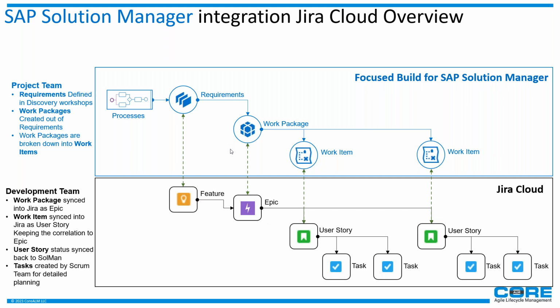And most likely what most customers start with is documenting the requirement in Solution Manager. They do the work packages in Solution Manager, which creates the epic in Jira, and then they break down the work items. And when they do these work items, they go in Jira as user stories, and these user stories